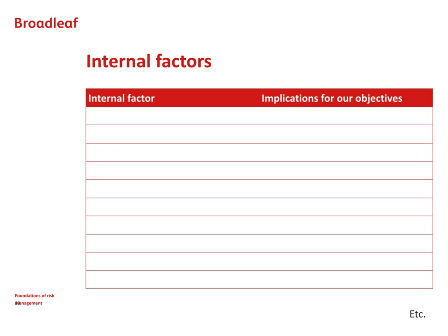Again here, we brainstorm all those factors and then think of the implications of those factors on our objectives, our ultimate purposes, the so whats. For example, if one of our internal factors is that we have a poor organisational culture, the implications are that the organisation will find it very difficult to drive for continuous improvement and to increase its revenue by a stated amount within the next 12 months without the full and full-hearted and complete support of all its employees.